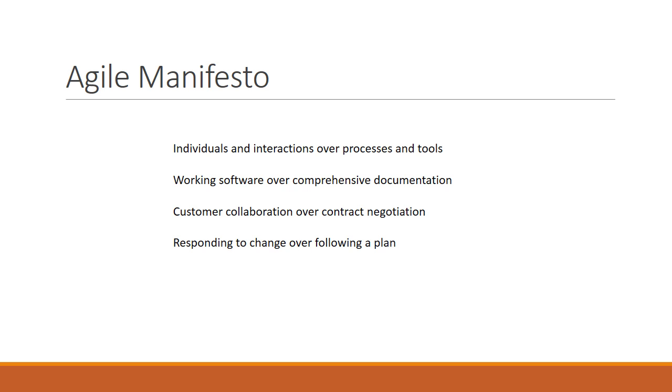Whereas in traditional project planning, you've got to stick to the plan. You've got to make sure every task is accomplished. The issue with that is that a lot of times, the task may not be well defined. There may be missing information. There may be things such as integration points not being properly defined. All the resources not properly identified. It just doesn't adapt well. And the problem is you don't usually find these things out until you're way down into the project.